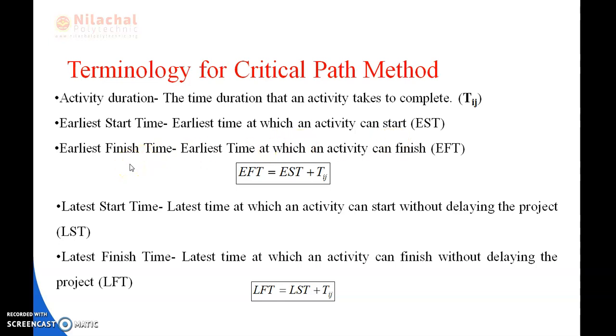Next is earliest finish time. The earliest time at which an activity can finish is called EFT, earliest finishing time. And this is one of the formulas. You can see here EFT equals EST plus activity duration, that is Tij. So this is the formula of EFT.